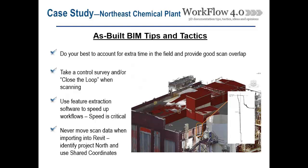A few tips and tactics: account for extra time in the field for things like throwaway scans due to vibration. Bright sunlight can also affect scans or color values. It's best practice to take a control survey as part of the registration process to help clean up any registration errors over long distances and avoid drift. If you can't get a control survey, at the very least find a way to close the loop — scan in a circular pattern so the last scan ties in with the first. This removes a lot of the drift inherent in a laser scanning process.